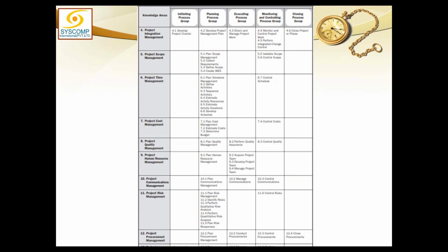There are only 2 processes. What are you supposed to be doing in initiation? You are supposed to be initiating the project. You are supposed to be authorizing the project. You are supposed to be developing a project charter and giving it to the project manager. So the project manager has to be assigned here, and the project manager is being given the charter.